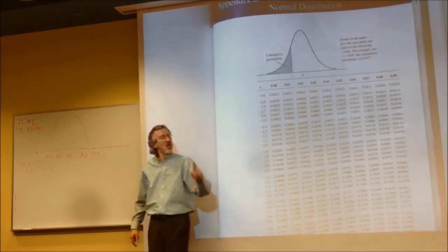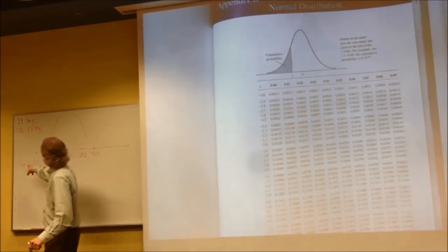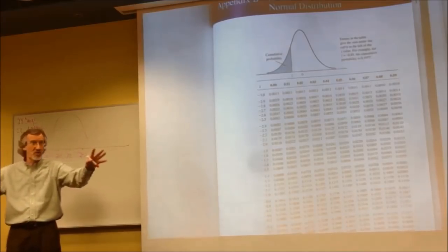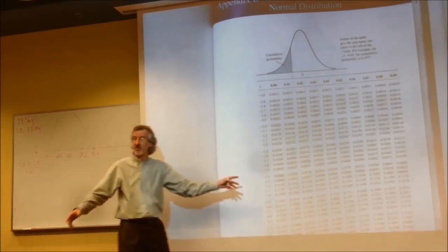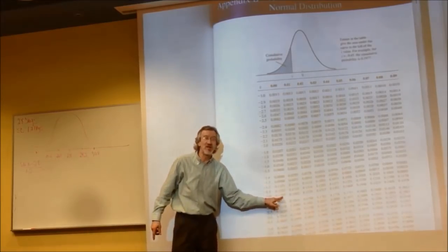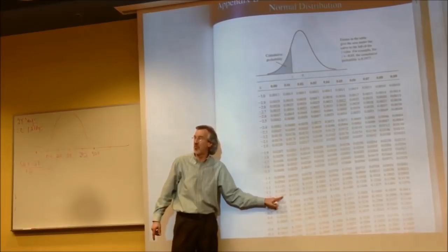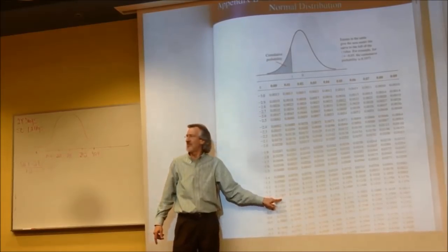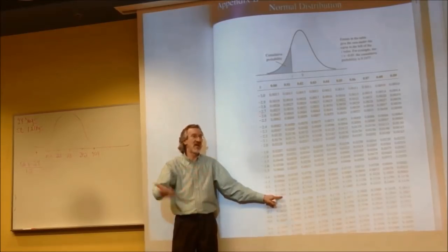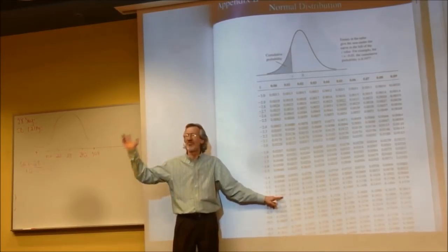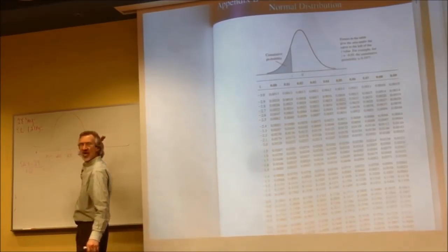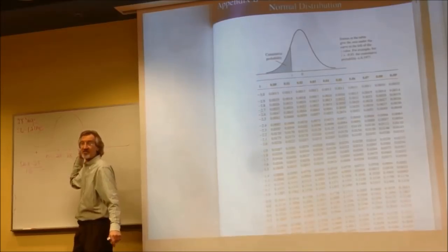So if I said to you, what's the probability it's going to be 26.8 days or more, it should be very simple for you to quickly say the opposite. He just said 100% minus 15.87. What'd you say, 83? I thought it was 7. Okay, 100% minus that is about 84.13, I guess. So there's about an 84.13% chance that it's more than 26.8 days.